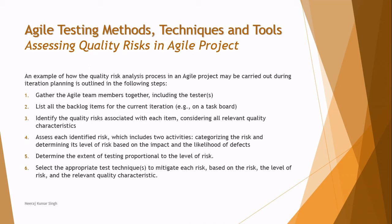Step three: identify the quality risks associated with each backlog item, considering all relevant quality characteristics. Step four: assess each identified risk. Risk assessment generally deals with determining the level of impact and the likelihood of that adverse event happening. Impact refers to severity, and likelihood refers to the probability of that event occurring, which depends on the frequency of use of that particular feature.